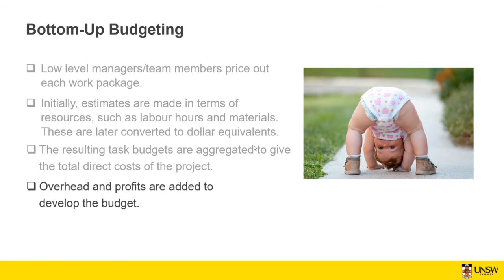More precisely controlled. Yep, all of that is true. So what about the disadvantages? Are there any disadvantages for bottom-up budgeting? Yep. So it can be a wish list for asking a lot of money. Time required. So you need to spend a lot of time to get the budget done, and it's more complex. It can also overestimate the budget. Yep. All of that is good.